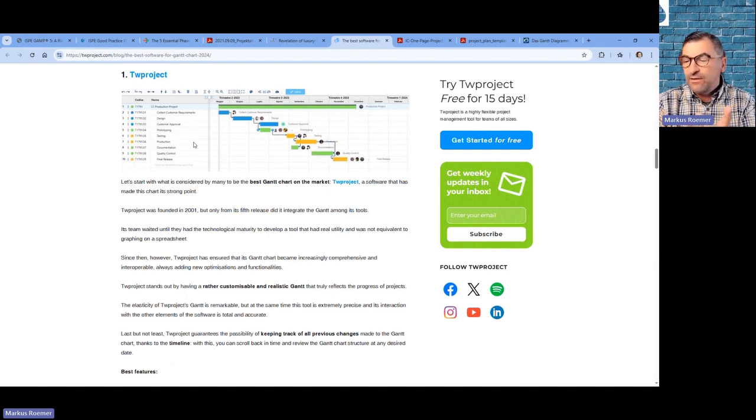You have not defined if you do weekly meetings, bi-weekly meetings, if you have a steering board, how often you do a presentation at the steering board level. Basically, you have no project governance if you don't have a project plan. This is only the execution. It's also very important, yes, but you must go through these logical steps: the initial phase, then the planning phase, and then the execution phase, right?